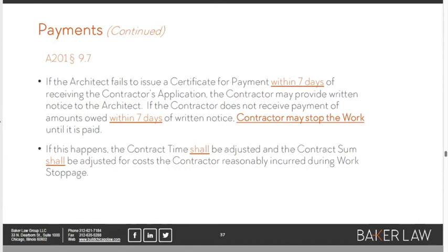Adopt a triage process, right? It doesn't have to be the project manager or the owner of the design firm that has to look at the pay app. Just have anybody knowledgeable, any mid-level employee at the architect, have them take a quick peek as soon as the pay app comes in. Are there any substantial deviations in that document from what that architect employee thinks is right?